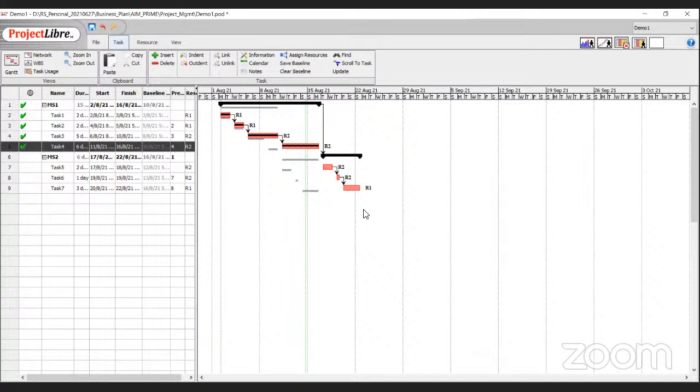Okay. More importantly, as you see the tasks in your weekly review, you need to look at things that have to finish in this week and the next week and the week after that. You have to look at the finish dates for those activities which are on the critical path. You have to watch them like a hawk. And when you watch them and you see that something is likely to get delayed, that's where you put in extra effort, because you know that anything that is on the critical path, if it is delayed, it will affect your entire time.